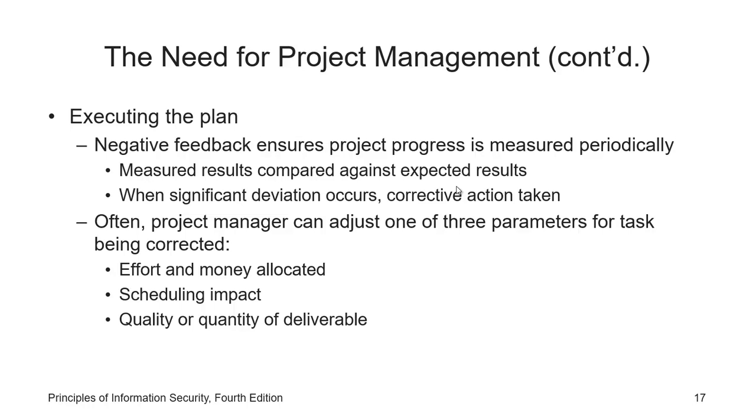Also, they can measure scheduling impact. They can change it if they see that the schedule for a certain activity will impact the whole project. So they can assign either overtime resources or additional resources just to make sure that that activity will be done within time and will not impact the project implementation.